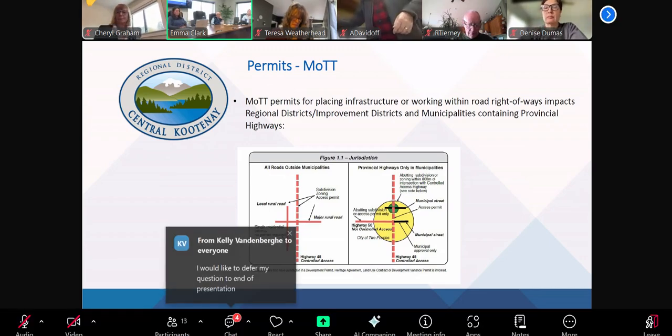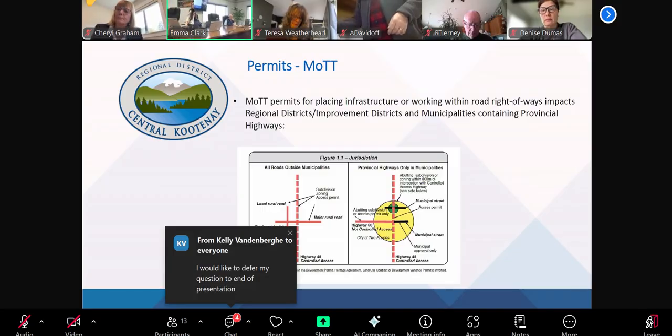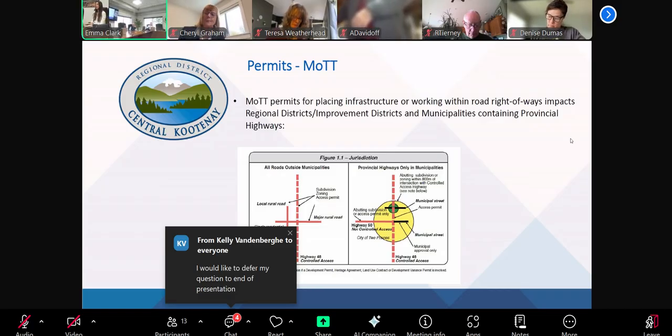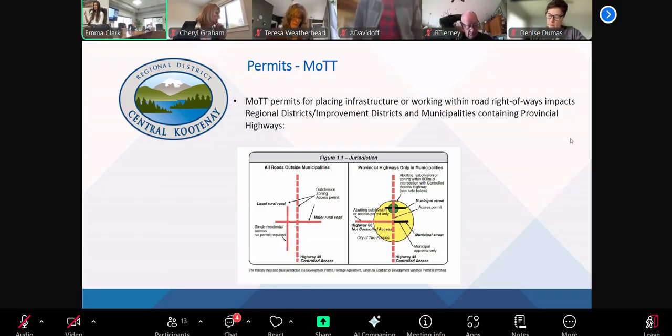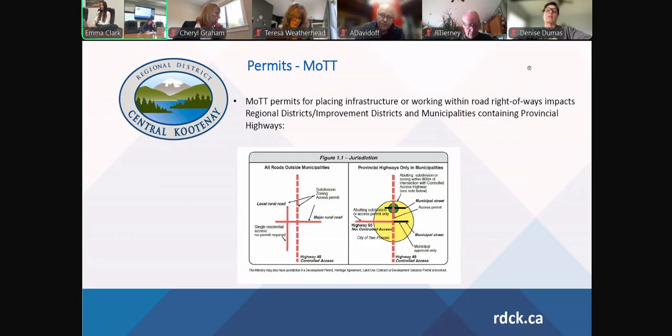Just something through the chair. As part of the tender package, the onus is on the contractor to include pricing for basic restoration. So that is, as Chris mentioned, any sort of settling, they would have to come back and deal with that, grass seeding, simple fences, and asphalt or concrete repair. That is on the contractor to repair and is part of their bid price.